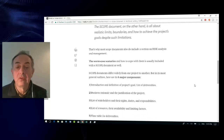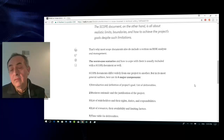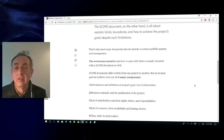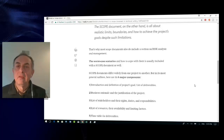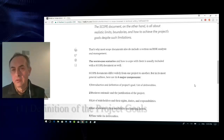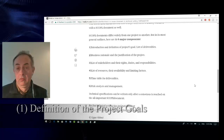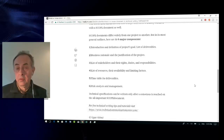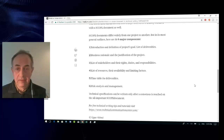The worst-case scenarios and how to cope with them are also usually included with a scope document. This document differs obviously from one project to another, but here are the six general components. The first one is the introduction and definition of the project's goal and the list of deliverables — what should the technical writer produce at the end?